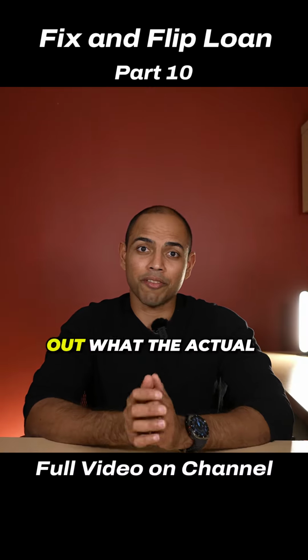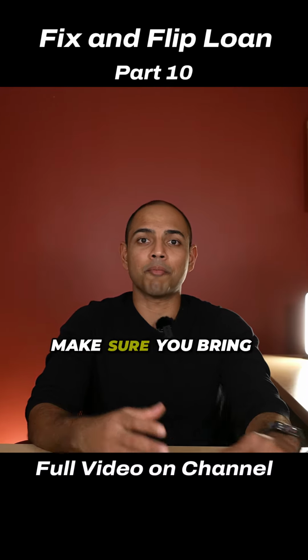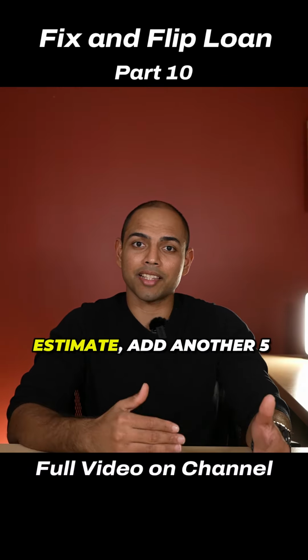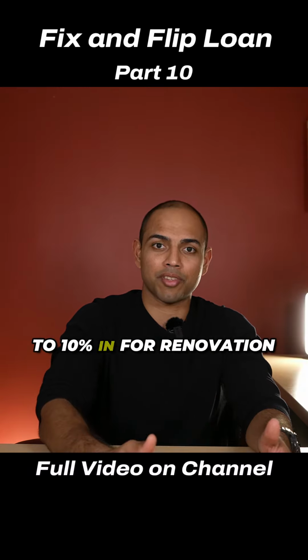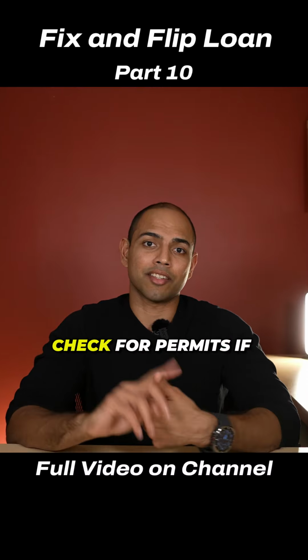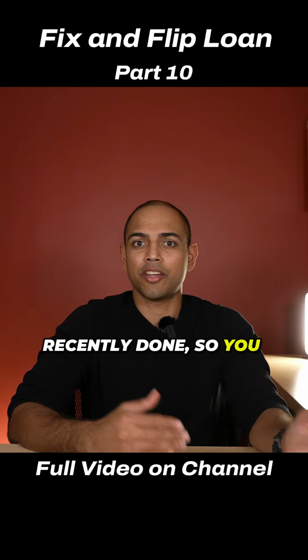And make sure you find out what the actual renovation costs are. So when you go to view the property, make sure you bring along a contractor who will give you estimates. Once they give you that estimate, add another 5 to 10% in for renovation costs, just in case something comes up. An important tip is to check for permits if there's an addition or if the roof was recently done, so you don't get screwed.